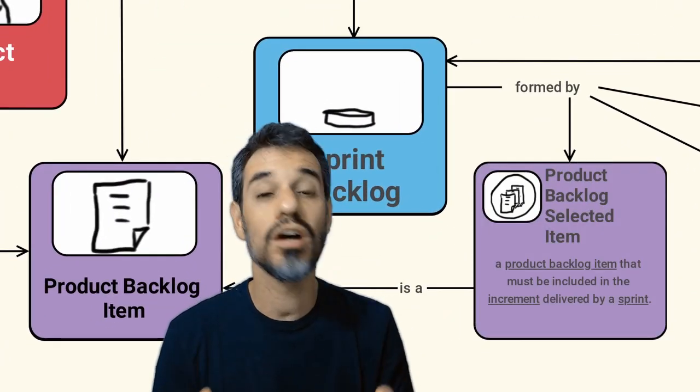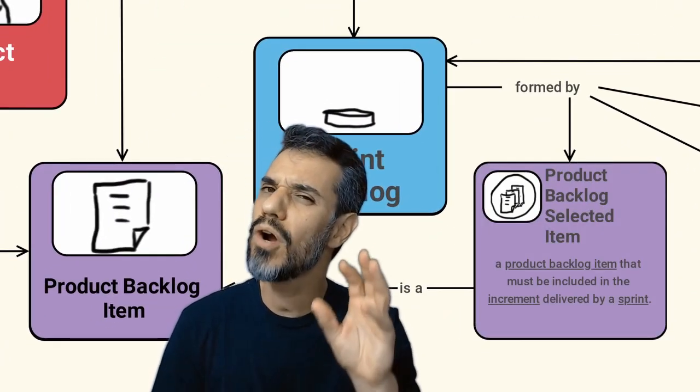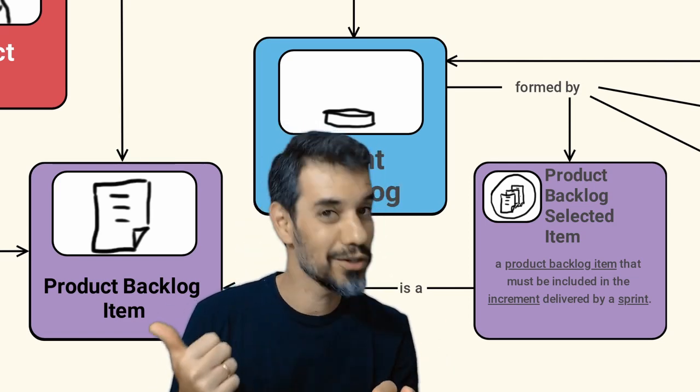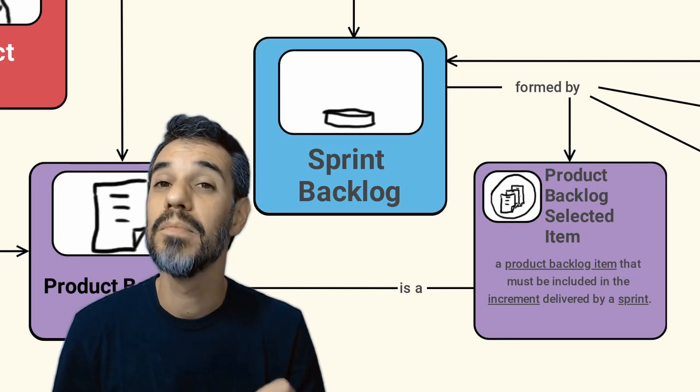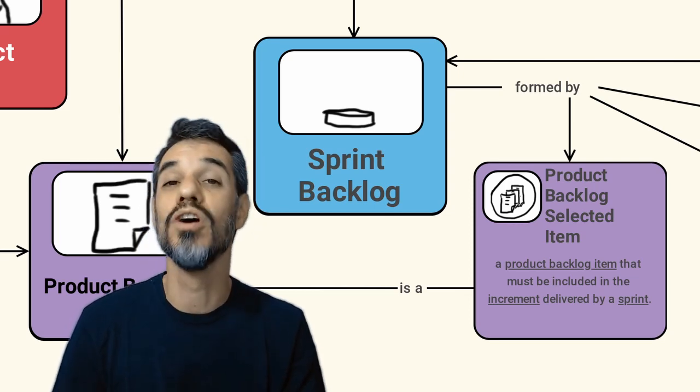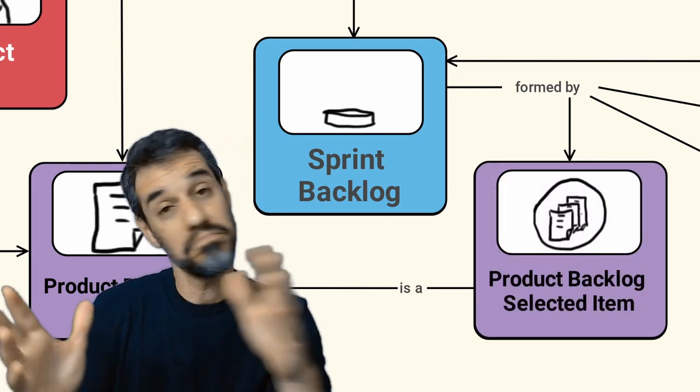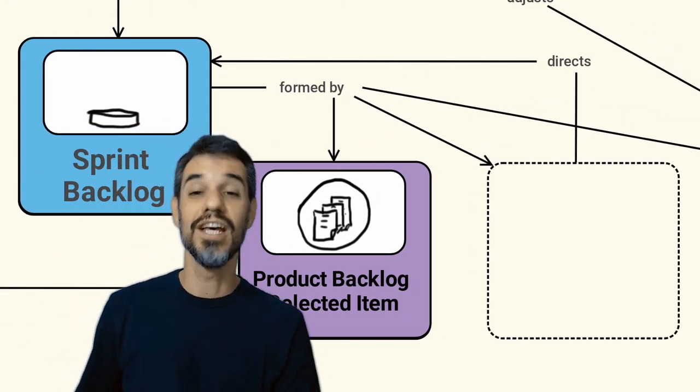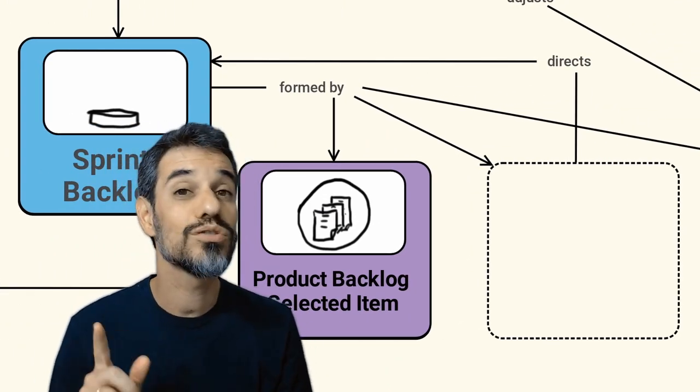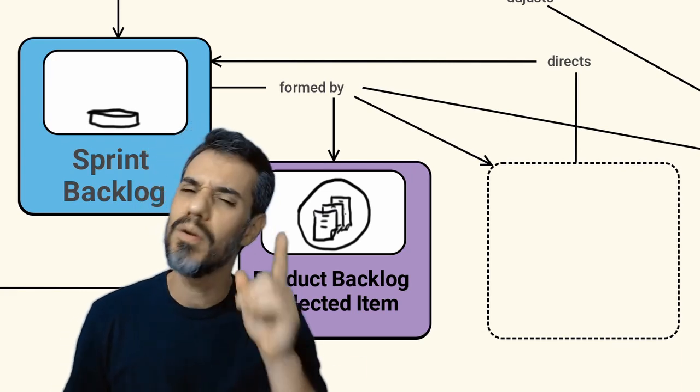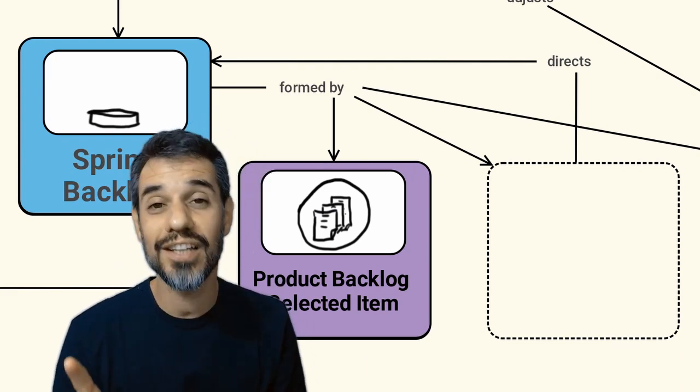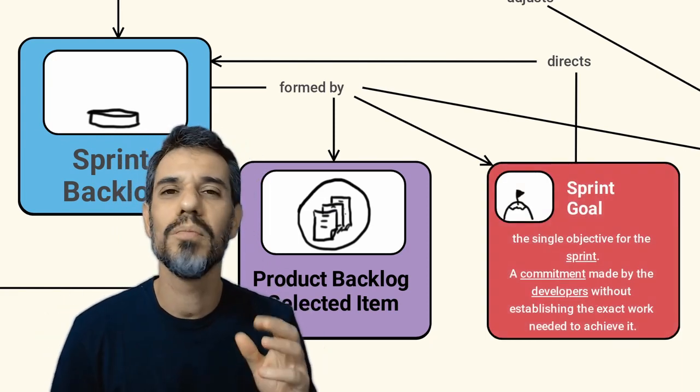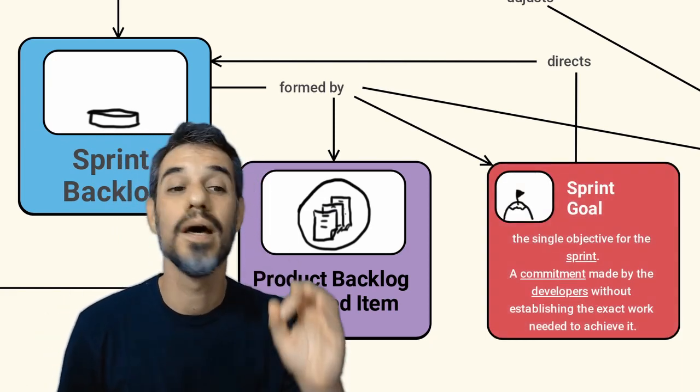A sprint backlog is formed by the product backlog items selected from the product backlog. The Scrum team must look for what is viable to be delivered during a sprint. Besides the product backlog selected items, the sprint backlog is also formed by a commitment. Remember that for each artifact there is a commitment. And for the sprint backlog the commitment is the sprint goal.